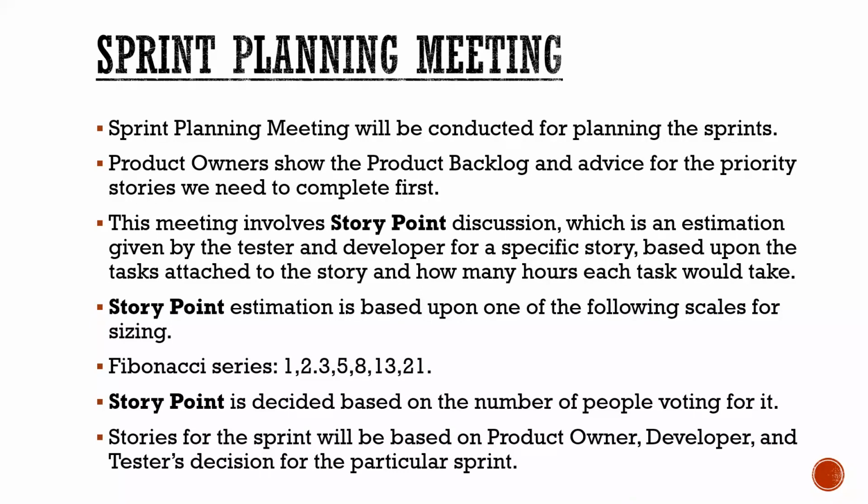They discuss the product backlog, what priority should be given based on the client requirement and everything, and what features are expected by the customer. We provide story points, weightage for the stories, the complexity of the user stories which we are accepting, and also discuss how many sprints it will take to complete the user stories. All these discussions happen in the sprint planning meeting.